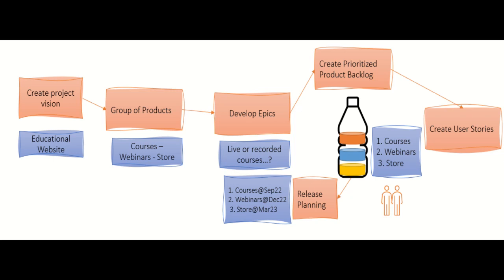And after that, you say, okay, for these 3, 4, 5 user stories, we can finish them as one output, not one product. The product is the full course, but I can make, let's say, the register page or the home page, for example. This is sprint number 1. So you collect a group of user stories and you say, fine, this is one sprint. We can finish it in 1 week. We can deliver it to the customer in 1 week.